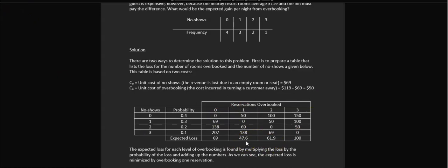Now what's interesting in industry, like in the defense industry, we have management reserve money that we hold off to the side that is not allocated to any projects or tasks from an earned value management system, EVMS, if you've ever heard of it. But in simple terms, you've allocated every dollar of your budget, but you know things are going to happen.